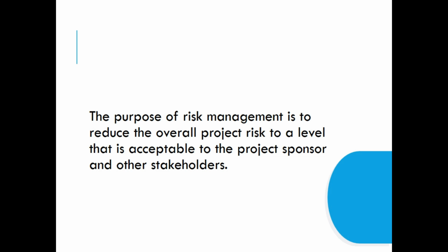It should have the description of the risk that is to be taken care of. It should talk about the type of risk, the probability and impact of the risk. It should classify the risk as a major, minor, or a medium risk. It should classify whether it is a known risk or an unknown risk, such things. It should classify the containment, correction, and corrective action of the risk. It should talk about the preventive action of the risk. We should also assign the risk to a risk owner to investigate further.